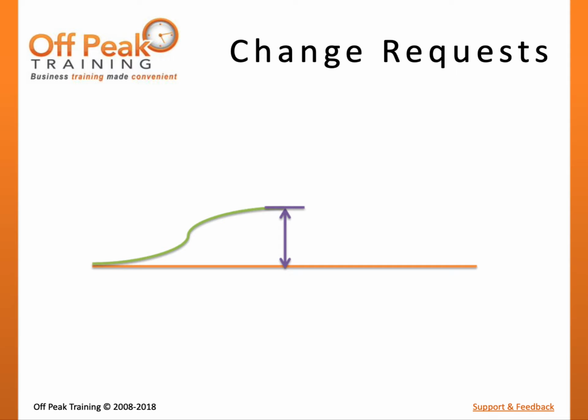Change requests are an output of nearly all monitoring and controlling processes. Anytime a variance between execution and the plan is observed, a part of the project is out of control. In control schedule, this might mean that the project is behind schedule. When this occurs, the project management team should seek ways to get back on schedule. This could include reducing the scope of the project, adding resources, potentially increasing costs, or extending the schedule baseline. All of these scenarios would require changing the project baselines.